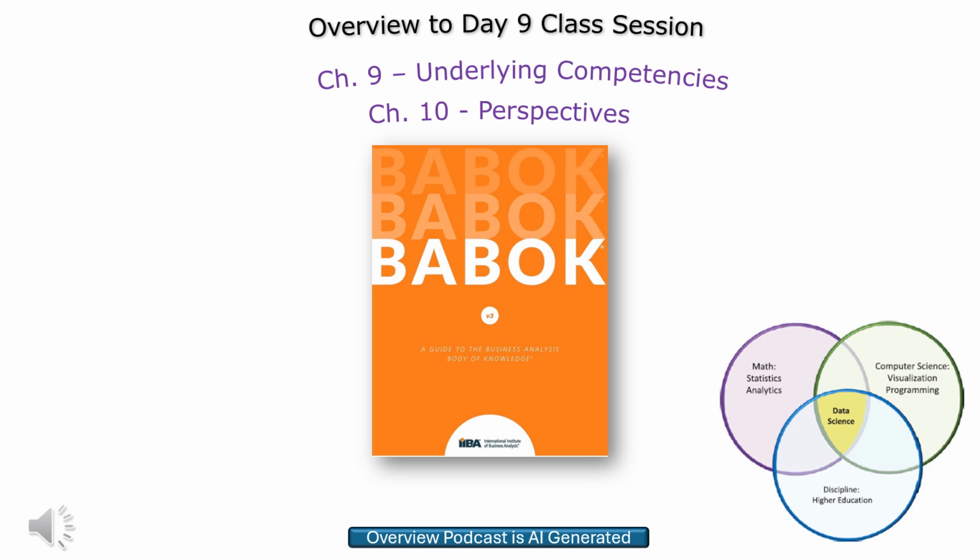Well, next we have manage flow and measure. Sounds kind of technical. Yeah, but it's really just about keeping things moving smoothly and efficiently. Think about it like a river. You don't want any dams or blockages preventing the water from flowing. So we're making sure those purchase orders aren't getting stuck somewhere. Exactly. Let's say our material buyer's waiting for a supplier quote, and the supplier's taking forever to get back to them. That's a bottleneck that holds up the entire purchase. So by managing the flow, the material buyer can see that bottleneck and try to fix it.